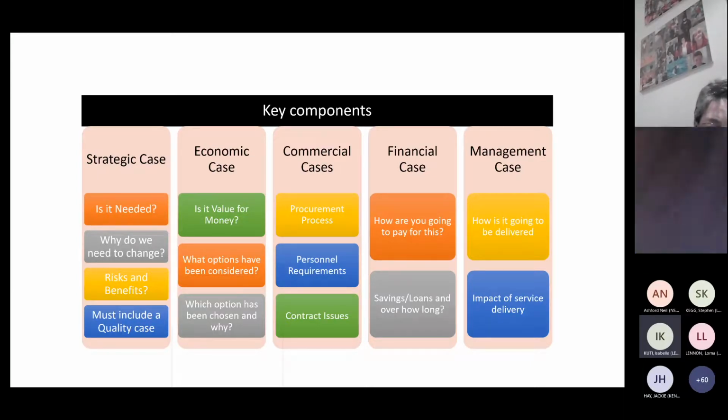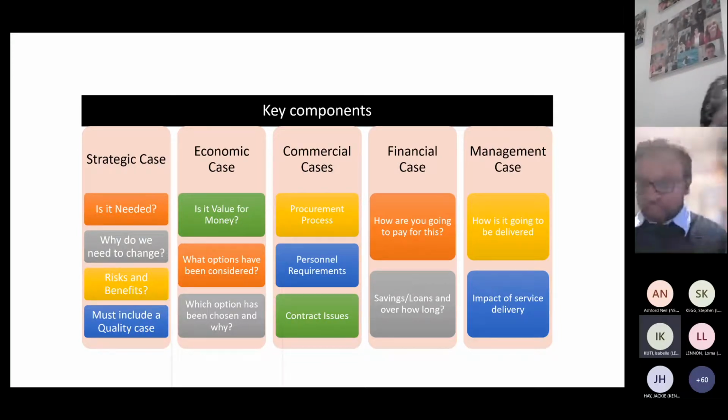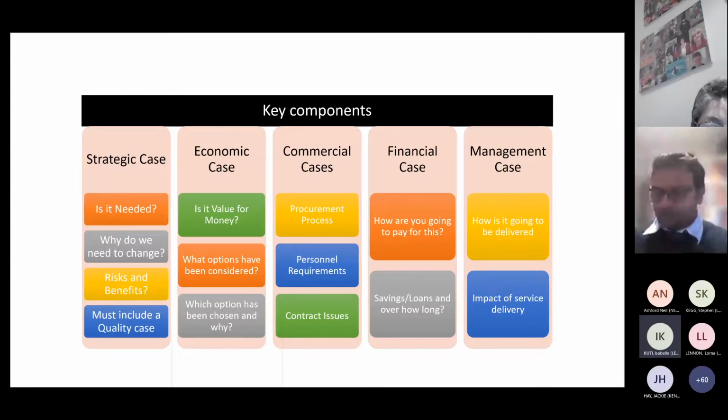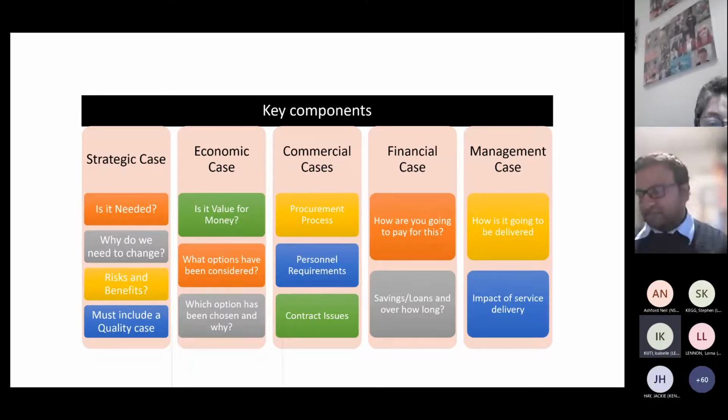There are procurement guidelines and specific amounts. I've got them in front of me. So the ones from 2019 are that if you are looking for supplies or services, depending on the impact, anything above £118,000 needs to go out to contract. That doesn't mean the individual value of a year's worth. If your contracting is likely going to be for 5 years, it's likely that you're talking about £100,000 worth, and so you may need to put it out to tender. So there's a whole process behind it.